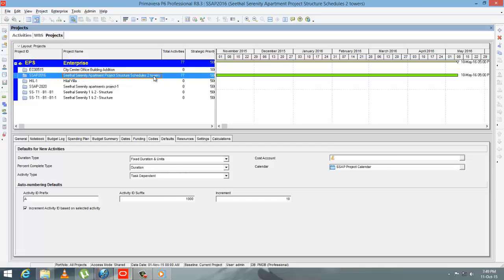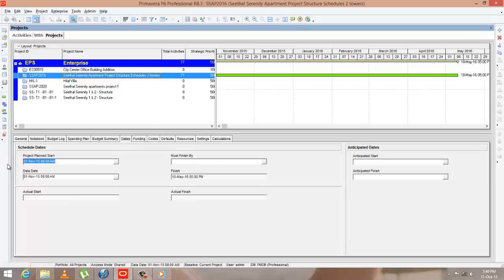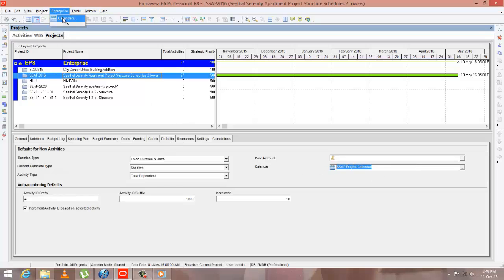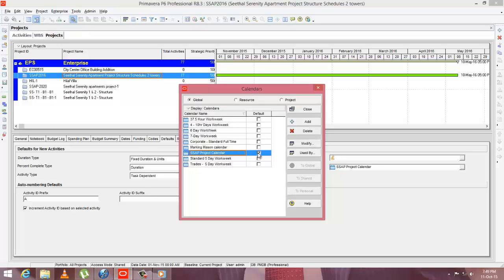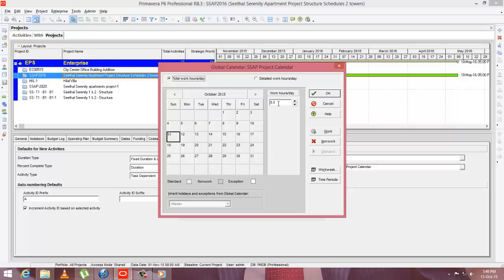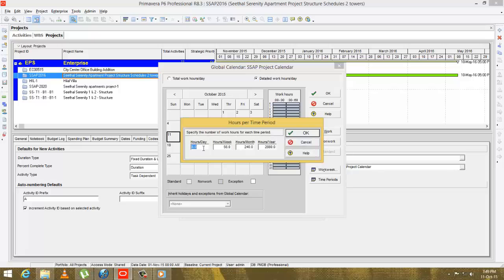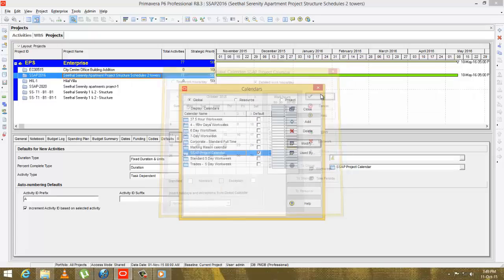Here's an apartment project where only the structure part is concerned. Go to the dates tab and check that plan start and data date are the same. Then go to the default tab and check the calendar again. You can go to the calendar option — make sure it's default, an 8-hour calendar. Project starts at 8 am, finishes at 5 pm. Check the time periods. Everything is fine — close the tab and open the project.